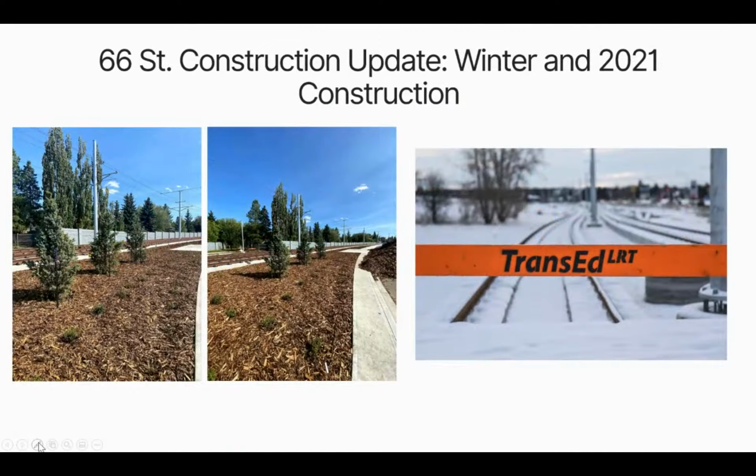So through the winter, we are aiming to have all of the lanes open. Now, it's important that you understand that we are very motivated to do that. And the reason I say that is, wisely, the city has imposed lane fees upon us. So when we close lanes, we actually have to pay for that. So we're motivated to do what we can to keep lanes open whenever possible.